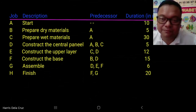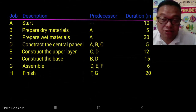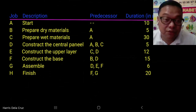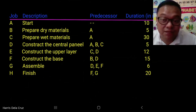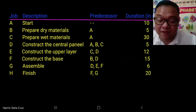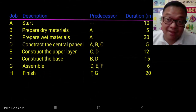Each job has a duration in minutes as follows: A is 10, B is 5, C is 30, D is 5, E is 12, F is 15, G is 6, and H is 20 minutes respectively.